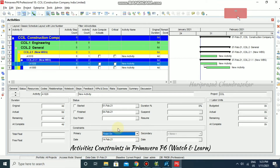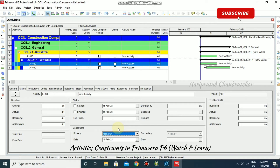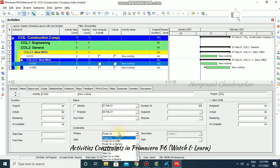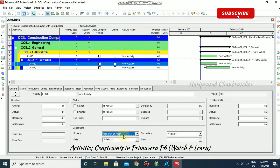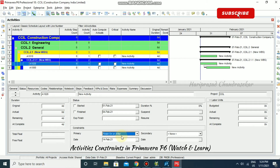We also have finish on. It's a restriction placed on an activity by imposing a finish date. It can delay an early finish or accelerate a late finish — if any activity is going to finish early, it will restrict that because we are putting this activity on finish on 14th Feb, and it also accelerates a late finish to satisfy the imposed date. We also have finish on or after, which is a restriction that limits the earliest time an activity can complete. It can finish on 14th Feb or after. This constraint reduces float to coordinate parallel activities, ensuring the finish is not scheduled before the specified date. It is usually applied to activities that have few predecessors that must finish before the next phase of a project.